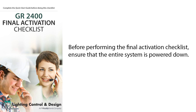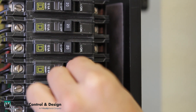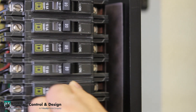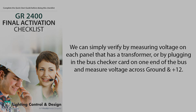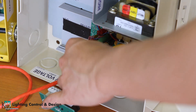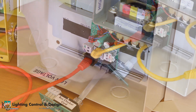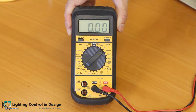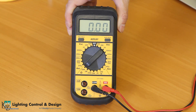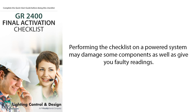Before performing the final activation checklist, ensure that the entire system is powered down. We can verify by measuring voltage on each panel that has a transformer, or by plugging in the bus checker card on one end of the bus and measuring voltage across ground and plus 12. Performing the checklist on a powered system may damage some components, as well as give you faulty readings.